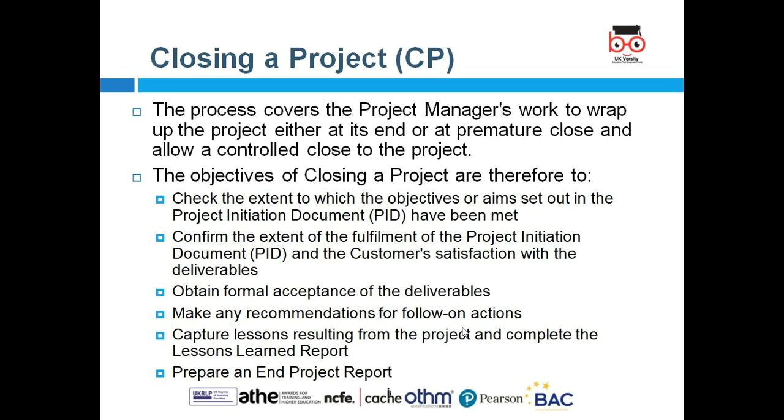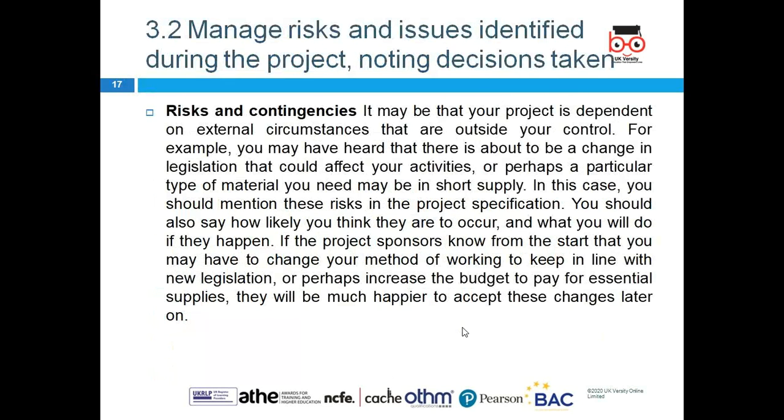So closing the project is very important. No doubt the planning, the control, and the closing stage work together. So the project manager's work is to wrap up the project, either at its end or prematurely, and close it and allow the control to close the project. So we can look at the project initiation documents. Whatever documents we generate should cover customer satisfaction with the delivery, maintain the formal acceptance of the delivery, make recommendations for follow-on action, and capture the lessons learned.